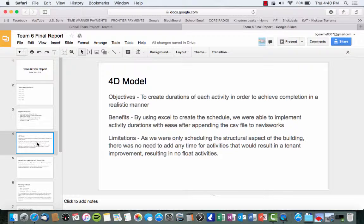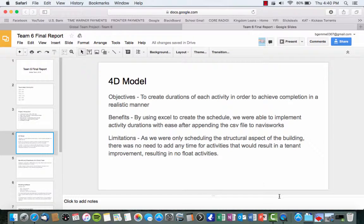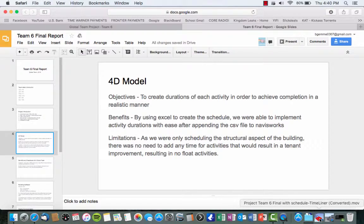Some limitations. As we were the only scheduling the structural aspect of the building, there was no need to add any time for additional activities that would result in a tenant improvement, like wall boards or anything like that. So it resulted in no float activities in the schedule. Now we're going to show a fly-through model of the building.